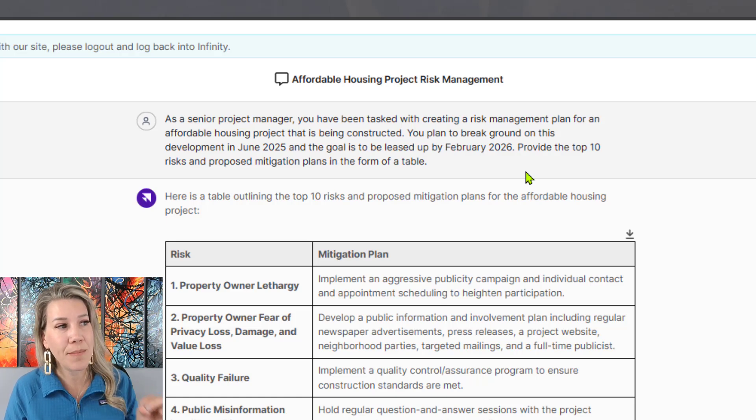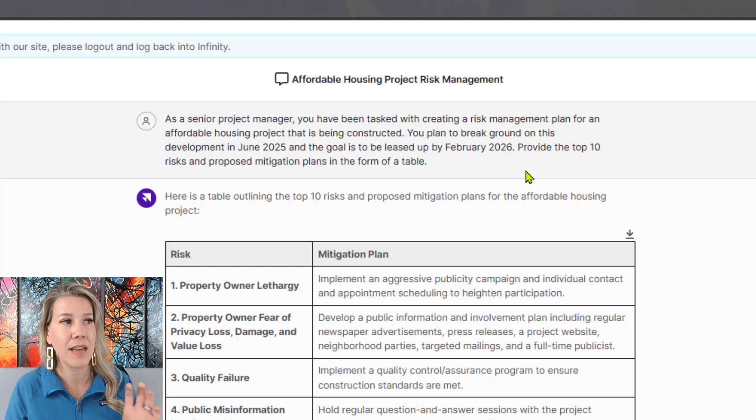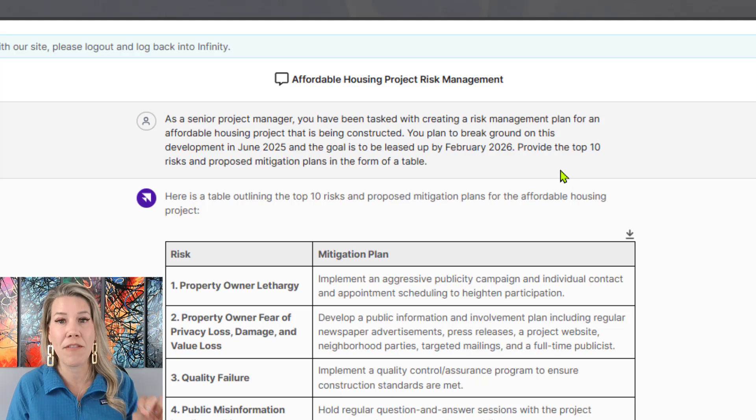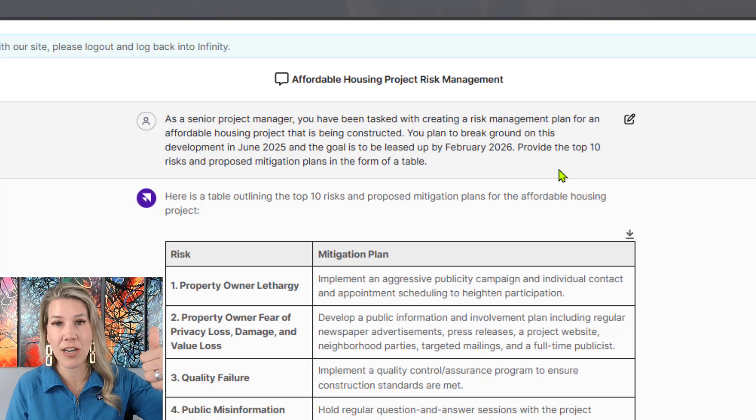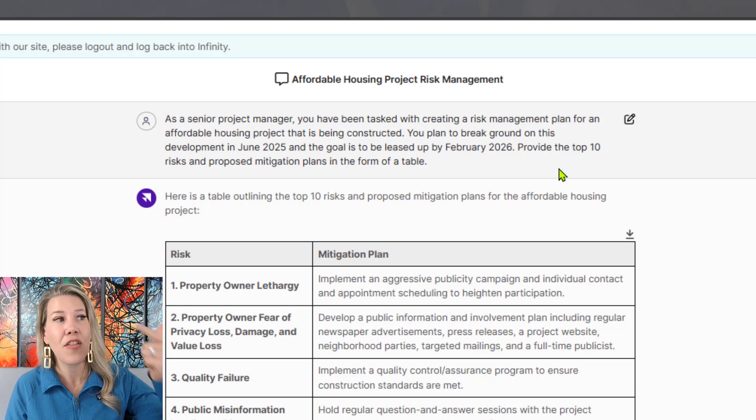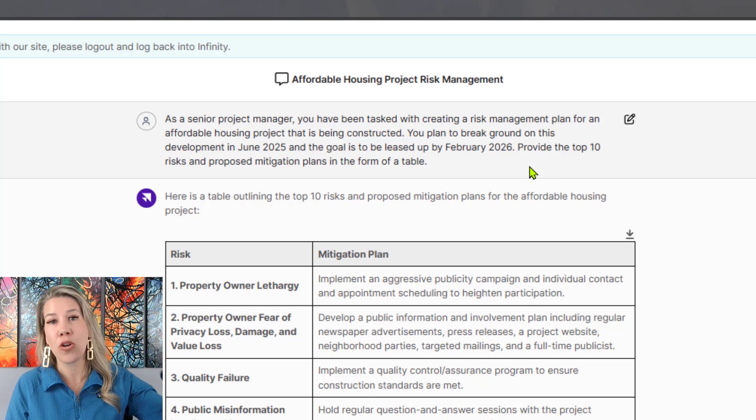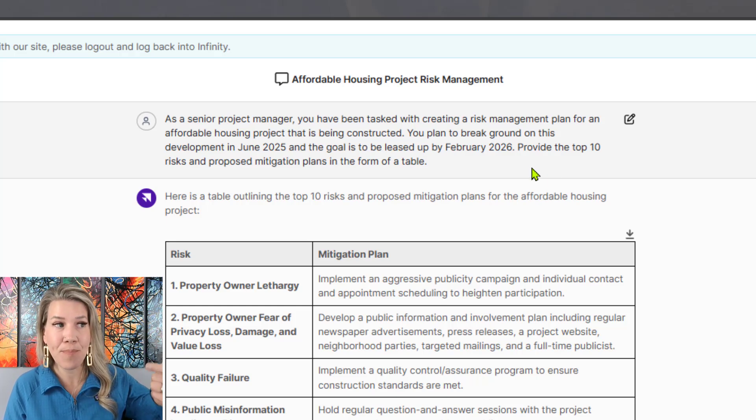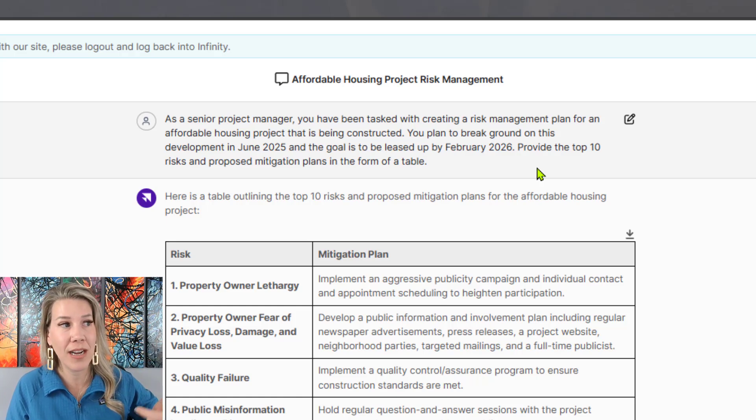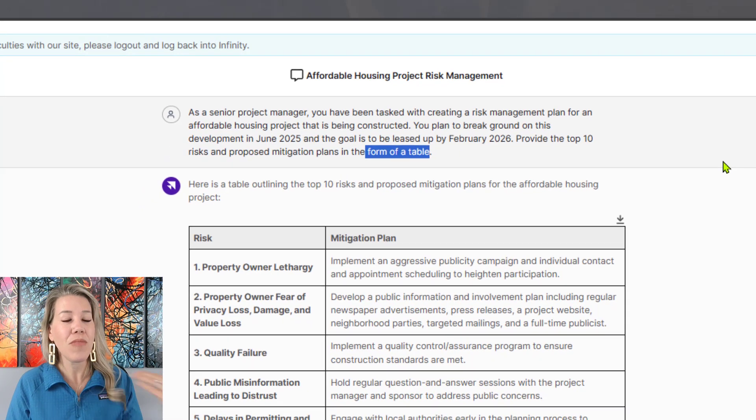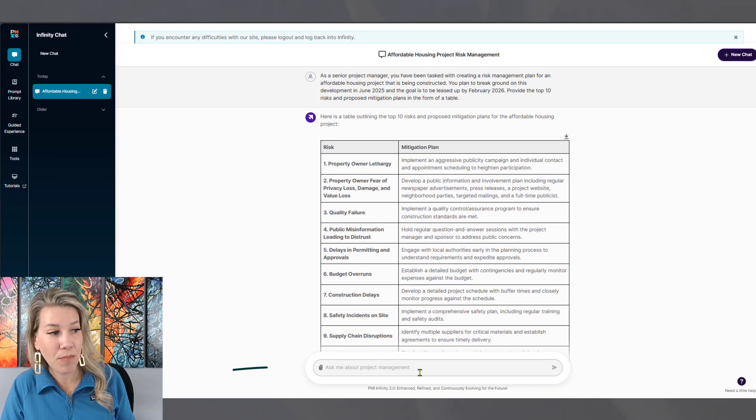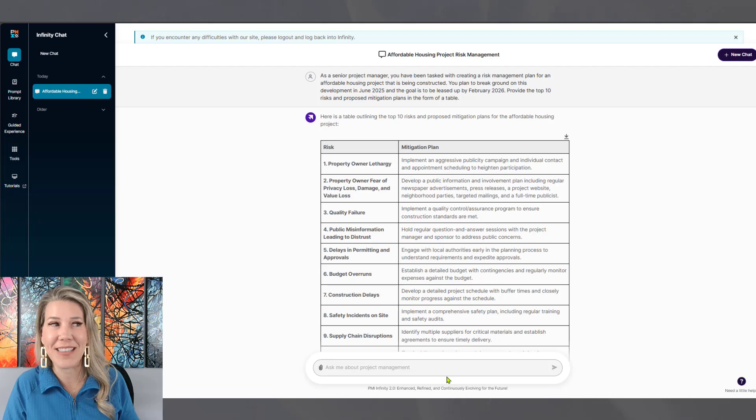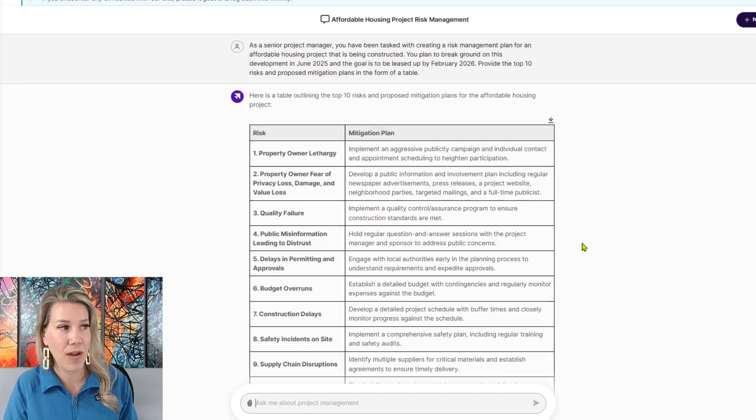You plan to break ground on this development in June of 2025. And the goal is to be leased up by February 2026. Provide the top 10 risk and proposed mitigation plans in the form of a table. So we use the R. So the role is a senior project manager. And we gave some additional context. The task is to help create a risk management plan and come up with the top 10 risk for this affordable housing project. And then we asked for it in the form of a table. So once I clicked enter and I typed that prompt right in here. So down here where it says, ask me about project management, I typed that all in. I clicked enter.